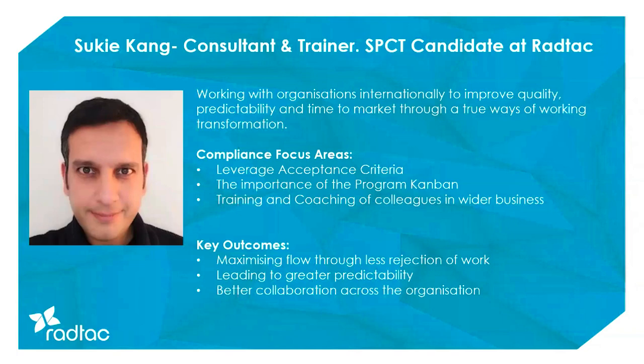Maybe just one more question that I could send your way, Kay, is you talked about the rolling wave budgeting. Is there a frequency or a cadence that you've seen work particularly well? Are these budgets being adjusted every 3 months, 6 months? What is it that you're generally seeing work well? I think, in my experience, it was an every 3 month type exercise. So we would be able to adjust the funding and the budgeting, given that feedback we were seeing every 3 months. But that's in an environment where there's a significant amount of change.